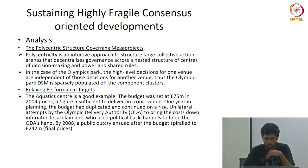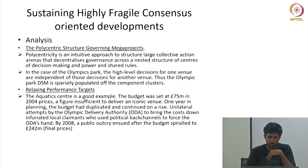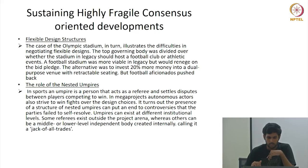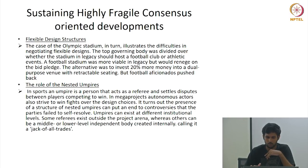Regarding relaxing performance targets: the Aquatic Centre is a good example. The budget was set at £70 million in 2004 prices — a figure insufficient to deliver an iconic venue. One year into planning the budget had to be revised, and by 2008 it came to £242 million. On the London Olympic Stadium, there was debate on whether to build for football or athletics. The football stadium was seen as a more viable legacy, but there was an alternative to invest 20 percent more and have a dual-purpose ground — however, football enthusiasts pushed back and a football stadium was built.